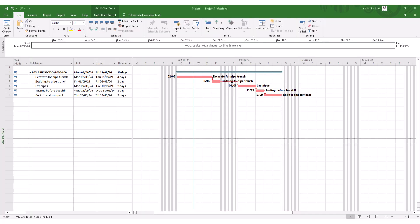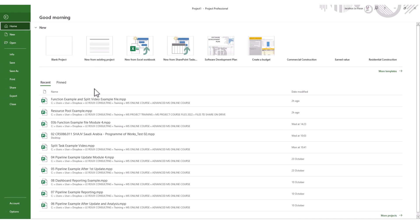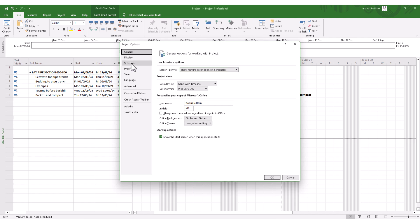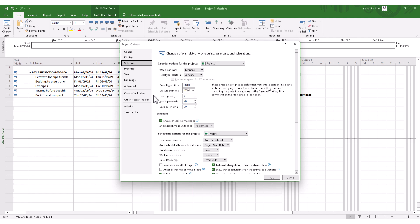The first reason why you may get a decimal in your durations is based on a calendar versus settings mismatch. If you go to File, click on that tab, go to Options, and on the Schedule tab, you'll see the foundational settings that Microsoft Project uses to determine your days and the calculation of days. The default start time is 8 o'clock in the morning, default end time 5 o'clock, hours per day eight, hours per week 40. These are the standard settings that MS Project uses when assigning values to tasks.